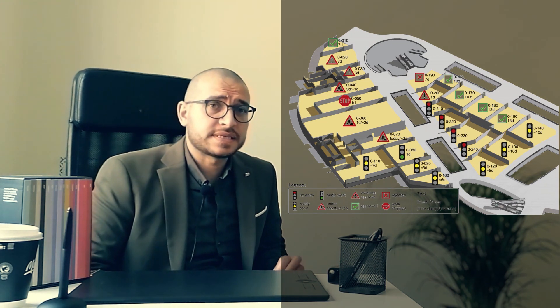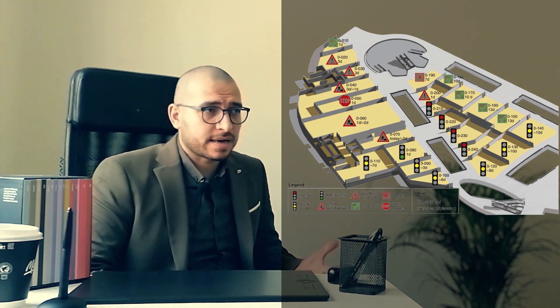For sure, there are attempts to involve them to achieve flow, like supplementing Last Planner System in a daily manner with the help of 3D models and using Kanban cards and alerts that give real-time feedback to manage construction projects. There are various examples. Anyways, construction problems will not be similar and will not come to an end. Always use creativity to maintain flow. That's my advice to you.